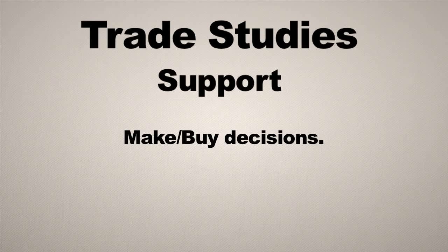Trade studies also support the make-buy decision process. In some cases, you'll go into the marketplace and find that what you need to perform a function is pretty common — there are vendors selling space-qualified units you can integrate. In other cases, your requirements may be too stringent or unique, so you need to make that component yourself. Trade studies help you determine whether to make or buy a given spacecraft component.